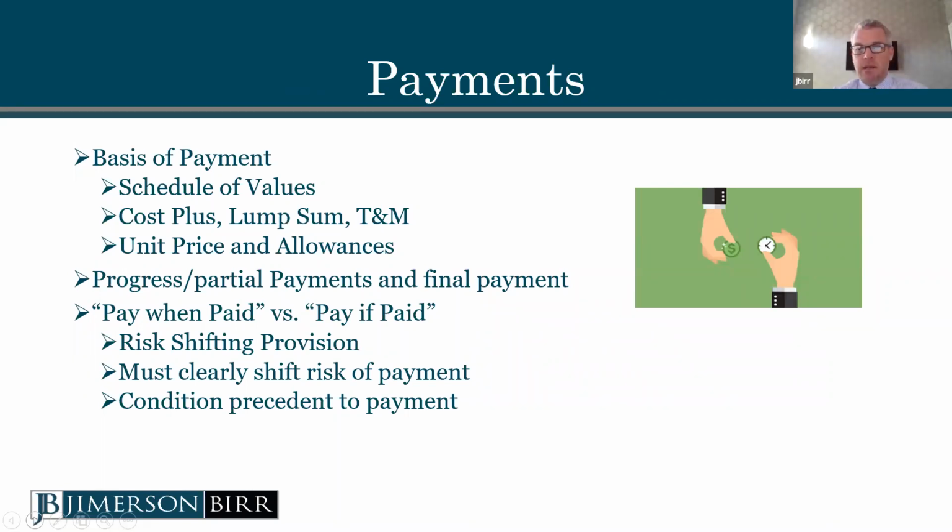So payments are an essential term of any contract, and those can be broken down in various forms through a schedule of values, which lists a particular scope of work and assigns a dollar value to that. And then in the construction context, if you use that as an example, a party will bill against that schedule of values as a percentage of completion of that work.